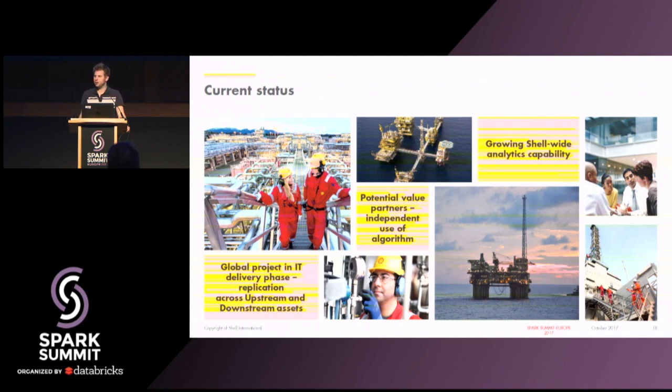And the challenge was, and this is where the science and the change management came together, we actually had to make some changes to the way that the tool presented information that we didn't purely agree with. We thought actually they were pretty silly. But the point is that to get the buy-in, we had to make some compromises because they needed to feel ownership. They needed to feel that they'd shaped the tool that came out of the project. And that was pretty challenging, to be honest. So it's definitely been a journey.